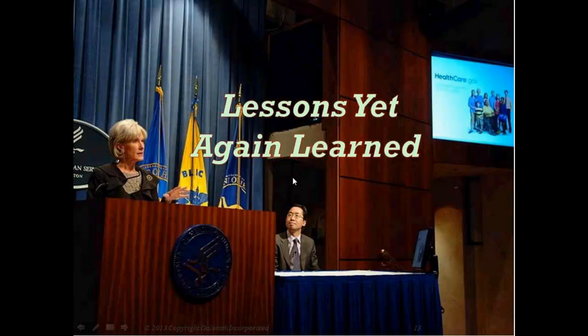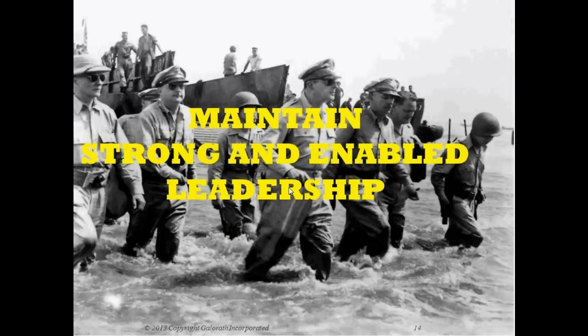Lessons yet again learned. You need a strong and enabled set of leaders. You need someone who's able to go to the key stakeholder, such as this fellow once was, to say you can or you cannot make a deadline and give that hard choice to that stakeholder. In this case, there was apparently no prime. HHS had never managed a project this big. You had a lot of coordination between 55 contractors, and you didn't have this level of strong enabled leadership.